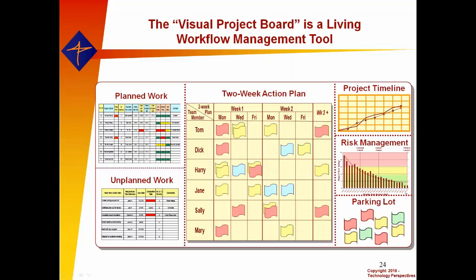In theory, that unplanned work is empty. In practice, there's always things in there. And again, one of our key goals is to try to get that unplanned work bin emptied as quickly as possible. If we see something pop in there, we try to squeeze it in a crack to maintain our plan. If it builds up to being too much effort, we may need to trigger a replan, absorb the unplanned work into the plan, and empty that bin.